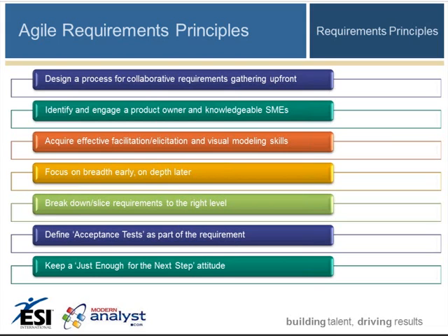Likewise, acceptance testing, which under a traditional approach within a software development lifecycle is often built as a phase which follows software development. In the case of an Agile project, where we are really dealing in very short iterative slices across the breadth of the project, acceptance testing becomes a part of the requirements defined at the level of the iteration itself.